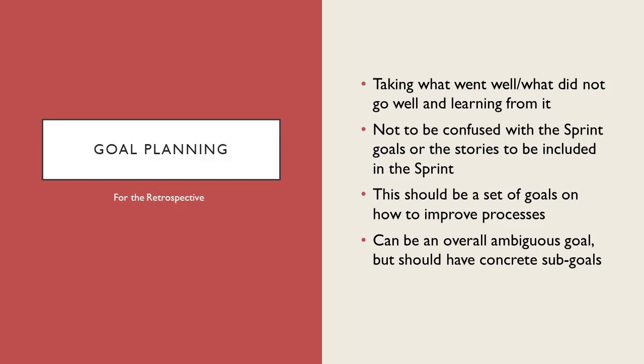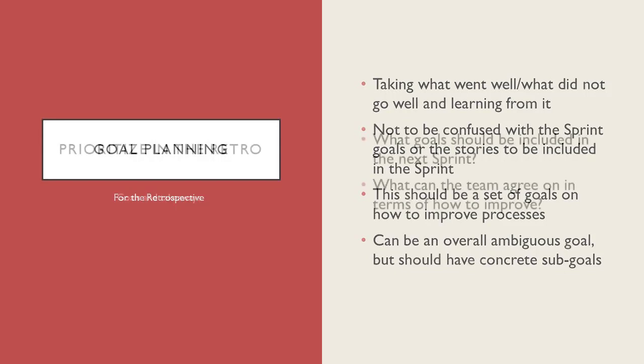So if you need to update the backlog to create a someday maybe board instead of just a backlog where it's these items that are clogging up the backlog that are just ideas more than they are actually fully formed stories, as an example. Maybe another example would be that you need to start accepting fewer stories in the sprint because developers are overwhelmed and task switching too often and don't necessarily know where to begin. So it's okay to make these changes to the actual items after the sprint retrospective, but it should be done in the context of improving the process.